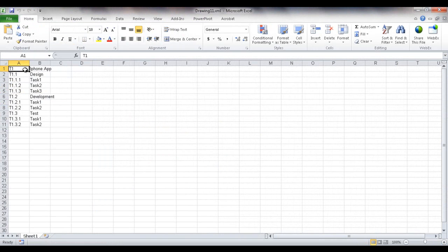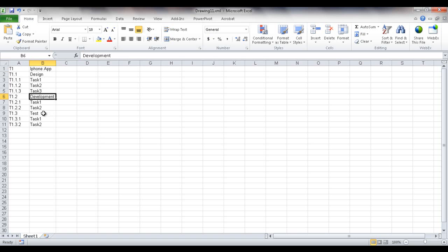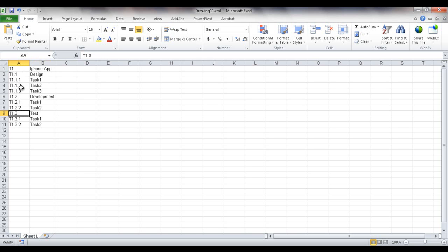And if you've noticed here, it has actually created an Excel document. And for the main topic, it has iPhone app. I'm going to double click that to auto fit it. It's got the different subtopics. You see design, you see development, you see test. And it's also numbered them. See, design is 1.1, development is 1.2, test is 1.3. And it's got sub numbering below it for each of the tasks or each of the different sub processes.